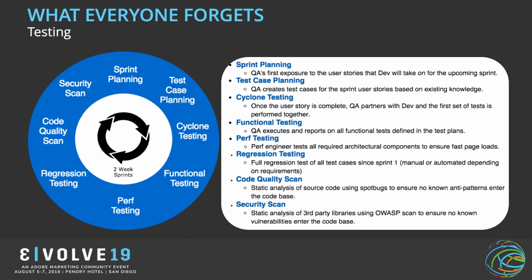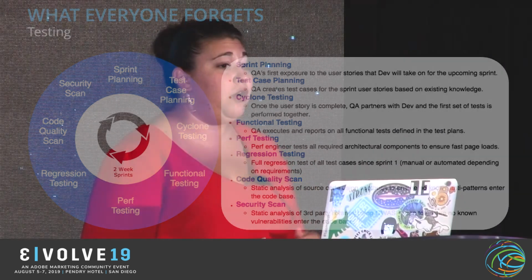We've often dealt with, from a best practice perspective, some testing requirements needing to be done before I can move from dev to stage and stage to production and ultimately launch my website. So am I testing across all the environments? Am I only required to test on production? Do some of those tests need to be vetted by IT or a QA group before we can move forward? So making sure you factor that into your timeline and are following whatever your best practice protocols is key.